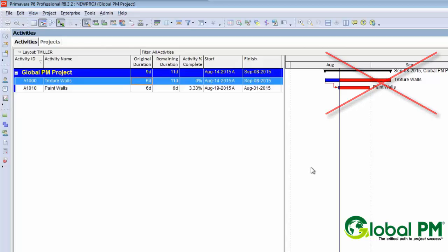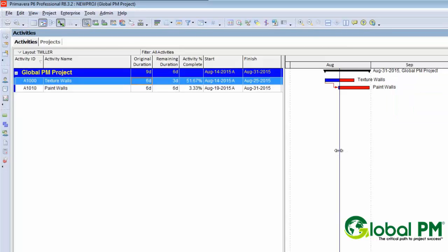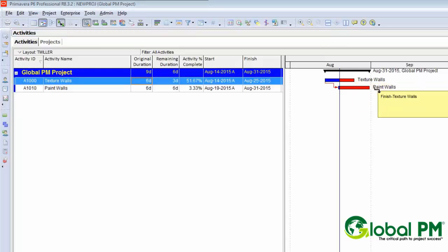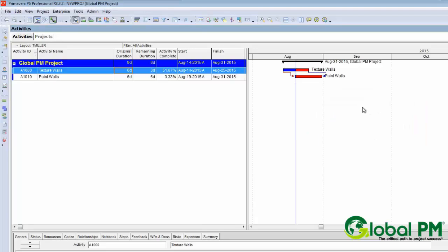It just can't happen. So the thing we want to do to give us an extra layer of protection is to also link these two activities in a finish-to-finish relationship — texture walls dragging to the finish of paint walls, and then I'm going to add a three-day lag. So we're saying that even if texture walls is delayed, you still can't finish painting prior to that. It would have to be at a minimum of three days after we texture.